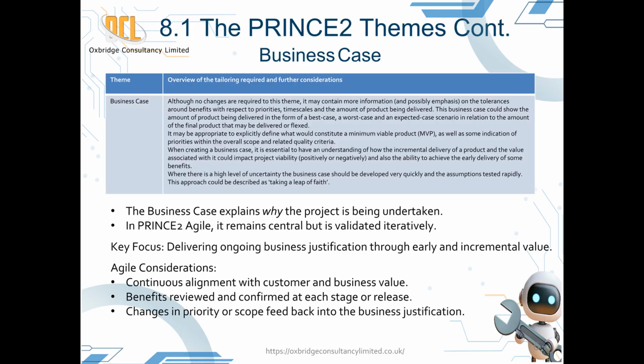The purpose of this slide is to explain how the business case theme functions in an agile context, ensuring the project continues to deliver value and remains justified as circumstances evolve. In PRINCE2, the business case answers a simple question: is this project worth doing? It ensures that every project starts and continues with clear business justification. The business case defines the expected benefits, costs, risks, and alignment with strategy, forming the foundation for decision-making throughout the project. In PRINCE2 Agile, the business case becomes a living document, revisited frequently rather than approved once and filed away.